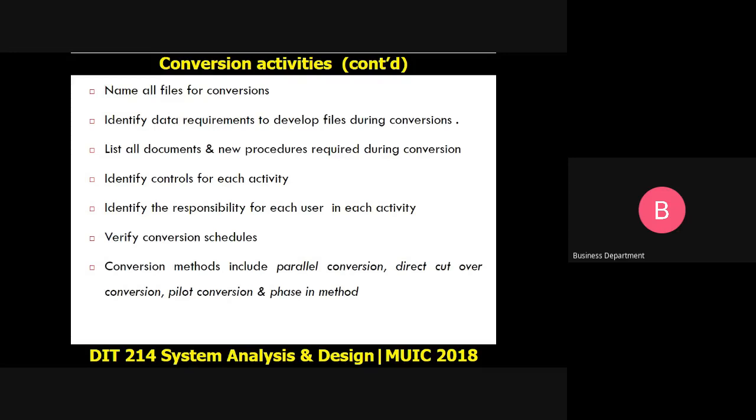We also do have the pilot conversion. A pilot conversion simply means I can pick a certain section, then I try to implement that system within that particular section. For example, I can maybe say in Marist, I'll pick the smallest department, let's say like IT, implement the system in IT, then let me see how the system fares. If I find that the system is doing very well in the small organization, then I can now start bringing in the other departments.